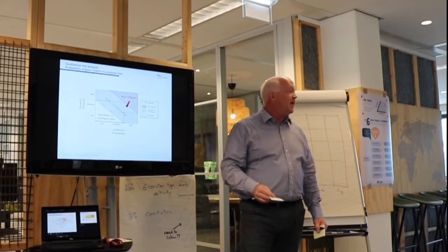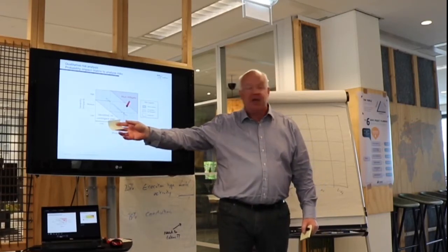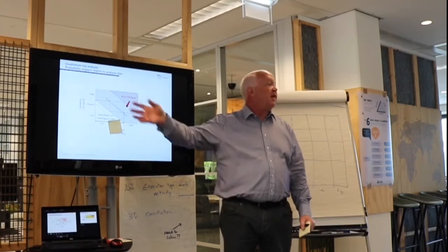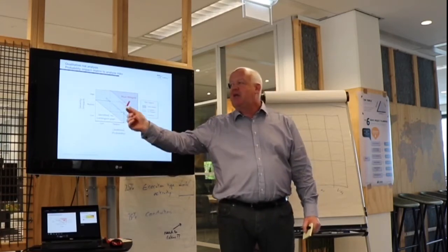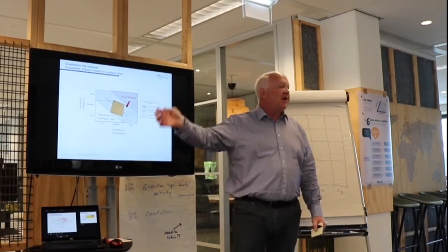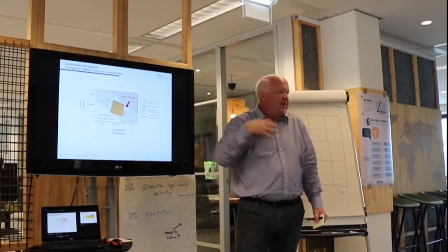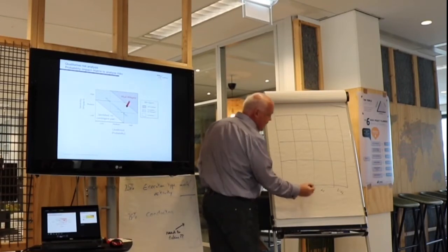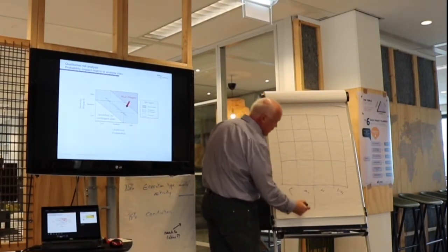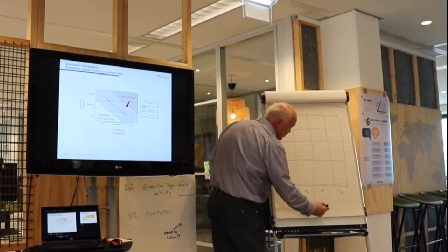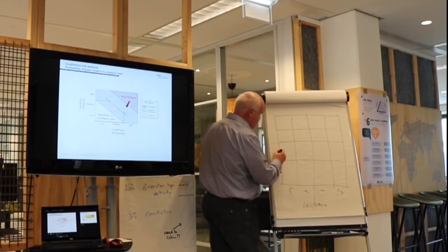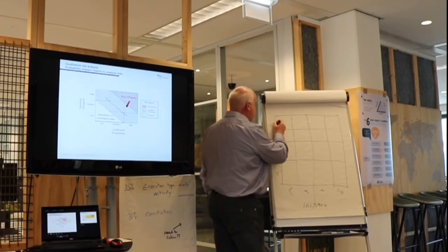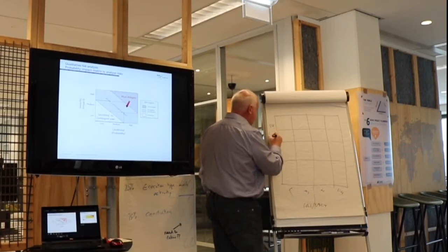So I'm going to play it safe and go in the middle. And I will do that for the impact as well. We see quite a lot of risks getting in the middle because that's human nature. So here we're forcing ourselves over this point, and let's say this is impact: low, medium, high, very high. This is our likelihood. Doesn't matter which way around we do it.